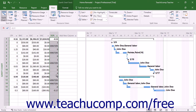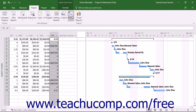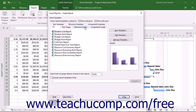Users of Microsoft Office Project who have Microsoft Excel installed can also create a visual Earned Value Over Time report. This is one of the many reports available in Project. This report shows a standard S-curve line chart that traces the cumulative value of three key indicators over time: the actual cost of work performed, the budgeted cost of work scheduled, and the budgeted cost of work performed. To create this report, click the Visual Reports button in the Export button group on the Report tab of the ribbon to open the Visual Reports dialog box. You must have the Microsoft Excel checkbox checked at the top of this dialog box to show templates from Excel.